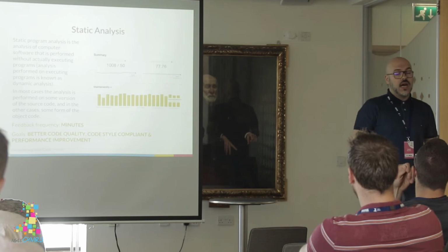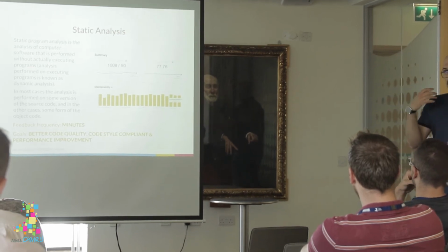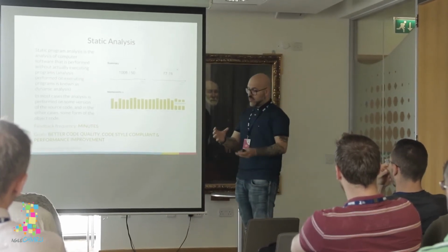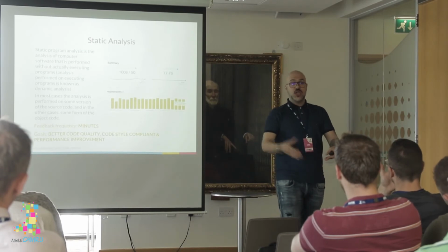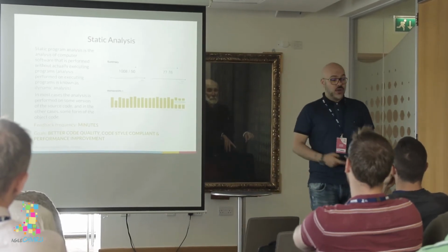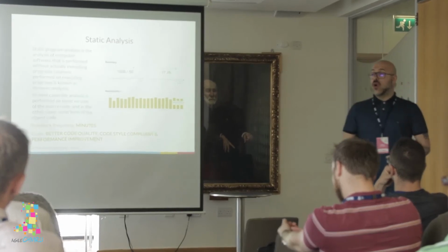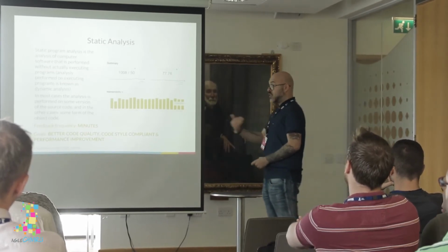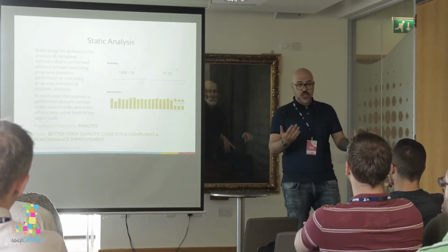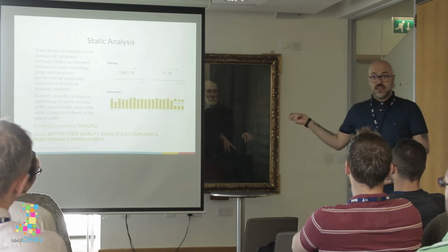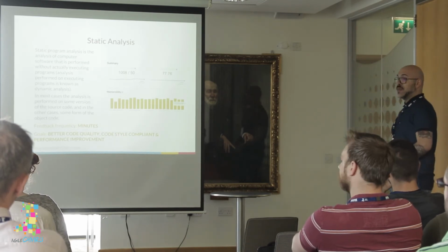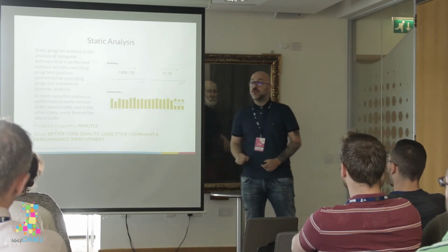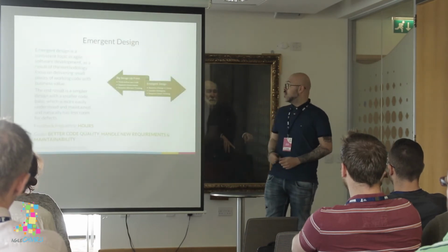You can apply this when you configure continuous integration. So every time that a developer merges code into the develop branch, you run this analysis, and you can understand immediately what's going on. Or before the release at the end of the sprint, in the staging environment, for instance, you can run this test. And it will tell you immediately if next sprint you have to spend some time on tech debt and solving some problems or not. In my opinion, it's very interesting.